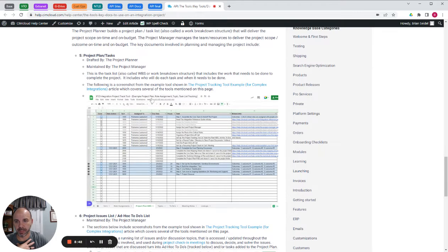So you're going to have some concept of what they call in professional project management a work breakdown structure, what I just call a task list. It's your project task list, or what needs to get done. So you're just listing out the steps and what you're doing. You can get fancy if you get into a bigger project and do Gantt charts and start and end dates and critical path and dependencies, or you can keep it simple and just throw a list together and throw it in a spreadsheet. Maybe have some deadlines on some key milestones that you're tracking. But there should be something there that resembles a handful of milestones that you're seeing in this example sheet.